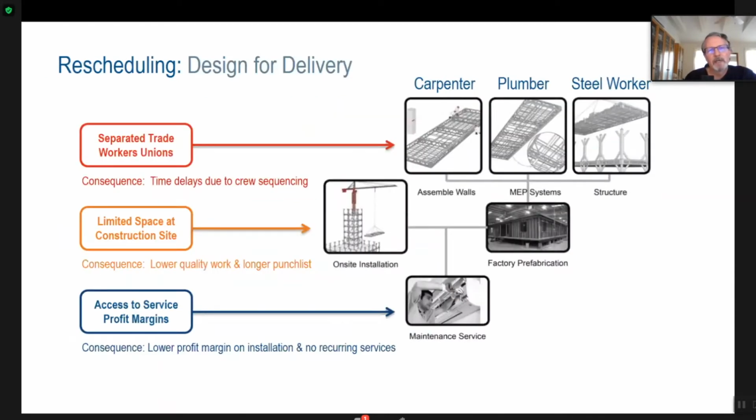Next problem is on-site congestion, and I think we understand that as well. We first have the structure put up, and then we're going to put in the slope piping for the plumbing, then we're going to put in the big MEP components, and then we're going to run the electrical systems, and then we're going to move up to the next floor and do it all over again. But as the trades move through, we end up with a problem of sizing of the trades and the sequencing of the trades and the stored materials the trades want to use, having it at the right location.